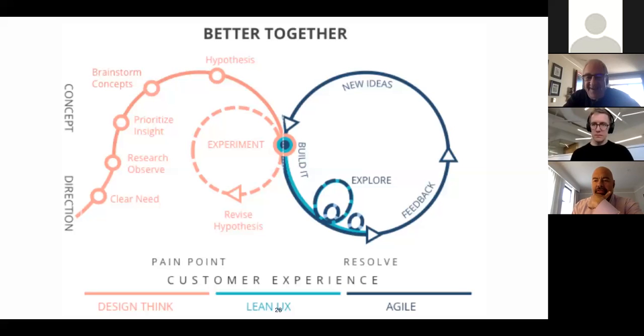From Megan. Does a feature get returned to the backlog if it's not completed? Yes. Mr. Kornfeld, what happens if priorities need to switch in the middle of a sprint, whether due to the team realizing it or based on the direction of a stakeholder? The overall, most general answer is I don't buy it. It's only a 2-week sprint. Don't change them till you get to the end. On average, you're talking about a week. The world will not end. Change your priorities when you get to planning the next sprint.